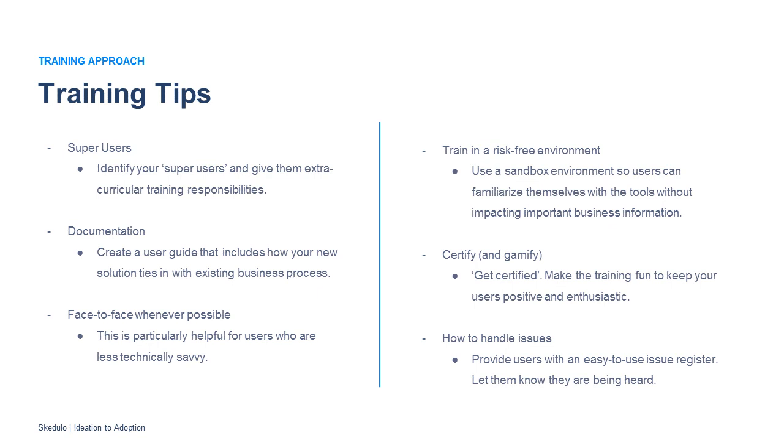If you're concerned about users accessing your system without training, you could create an internal certification. You can require users to get certified before using the new system by completing a short test or some other demonstration of knowledge after training. Gamify the process with a small reward for the first people who get certified. You could have a leaderboard or badges, have some fun with it. This doesn't motivate everyone, but some people really do love gamification. And let your users know what to do if they encounter an issue using the system. Give them the contact information for the team or individual to go to for help.